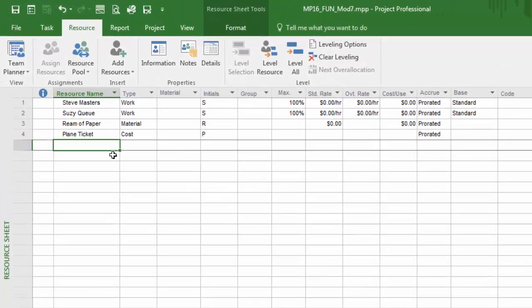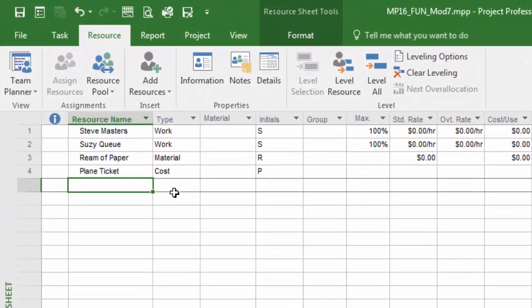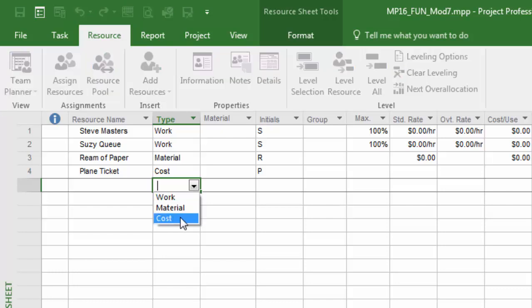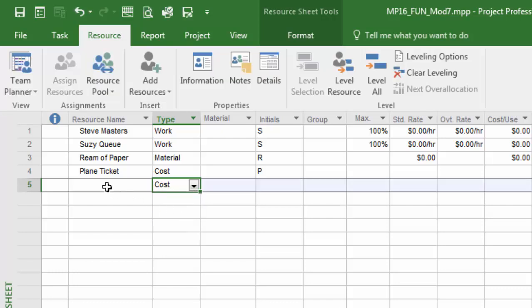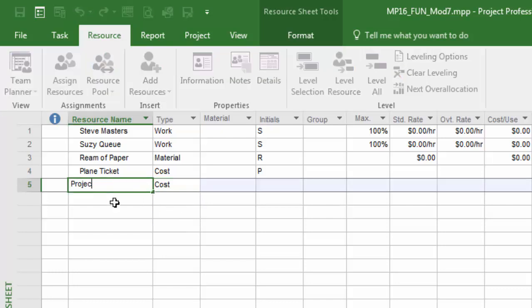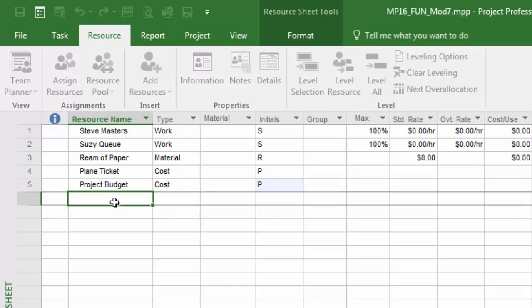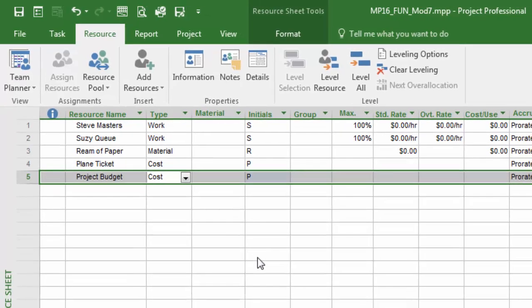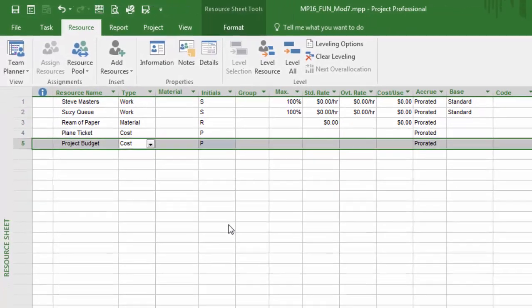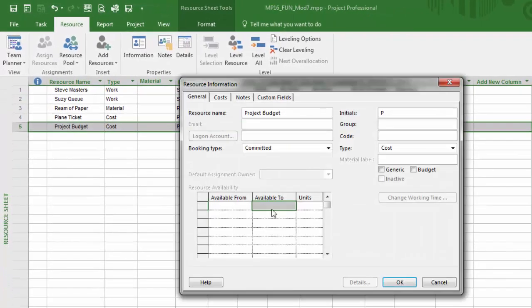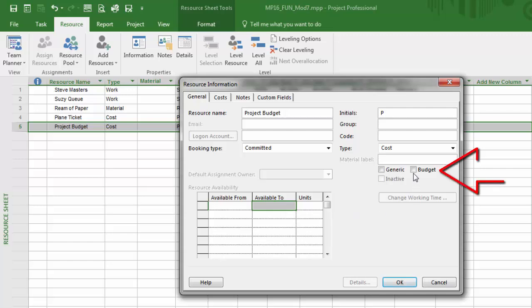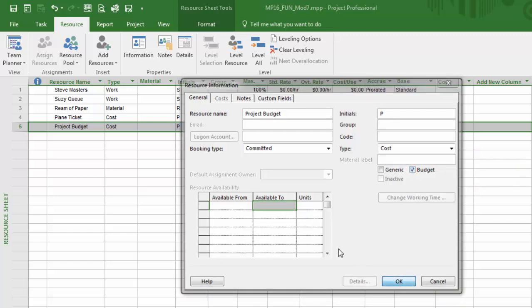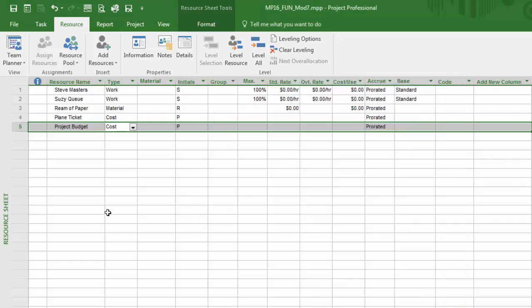First, we'll set it up as a cost resource type, then we'll give it a name that's going to help us identify it like 'project budget.' Lastly, we need to go into that resource and set that attribute to budget and click OK.